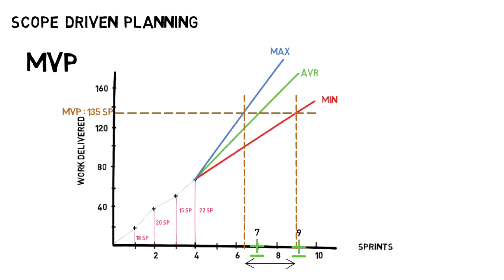A very important point to not forget when showing this data to your stakeholders is that this is not exact science, but predictions based on the data you have today. The more you work on your product, the more data you get, and the more precise you can be. Based on this burn-up chart, the product owner can give an estimation of budget required for the minimum viable product, for example.